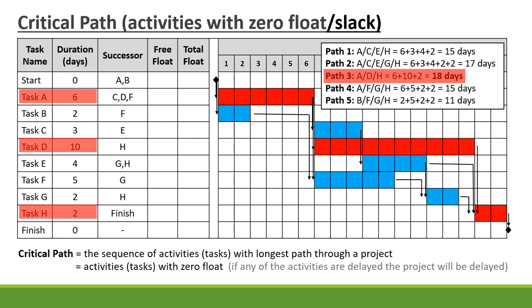So our critical path is A, D, and H. If A, D, or H is delayed, the project will be delayed.